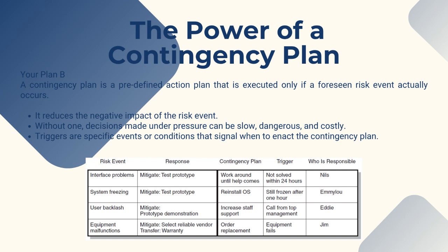We document all of this in a risk response matrix, as shown here. It clearly lays out the risk, the proactive response, the reactive contingency plan, the trigger for that plan, and who is responsible for taking action.